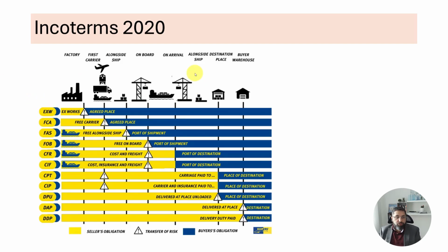So this is extremely important in international or global procurement. And we don't study procurement in this course. We're focusing on logistics. Other courses you may look at procurement and they may not cover that there. So you have to connect the things and make sure you compare apples to apples when you compare supplier prices. You add in the duties and the tariffs, you add in the transportation expense, and see what is the landed cost for using that supplier. What is the cost of the item when it lands at your facility, having gone through ports, having gone through customs, having gone through all of those expenses.